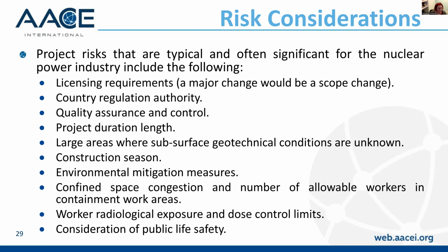So what we really want is a realistic view of the project, and the stated estimate ranges that are included in this RP are dependent on the premise that we are providing a realistic, unbiased and objective estimate. So if we fail to appropriately address systemic risks during our risk analysis process, this will impact our probability distribution for the estimated costs.